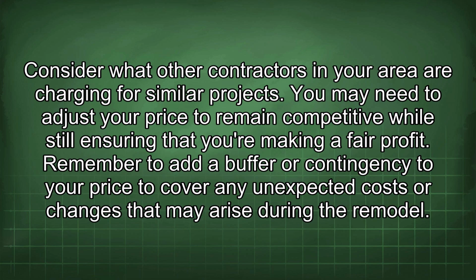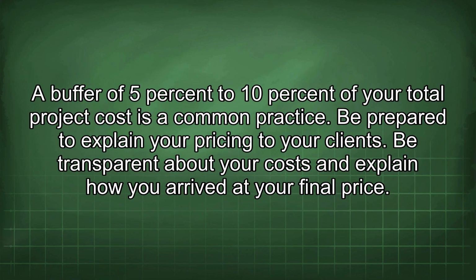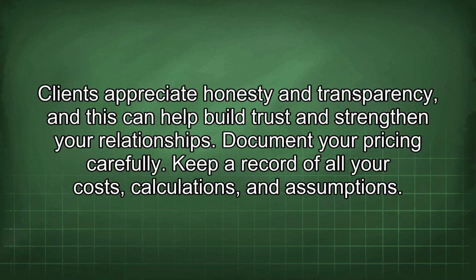Remember to add a buffer or contingency to your price to cover any unexpected costs or changes that may arise during the remodel. A buffer of 5% to 10% of your total project cost is a common practice. Be prepared to explain your pricing to your clients. Be transparent about your costs and explain how you arrived at your final price. Clients appreciate honesty and transparency, and this can help build trust and strengthen your relationships.